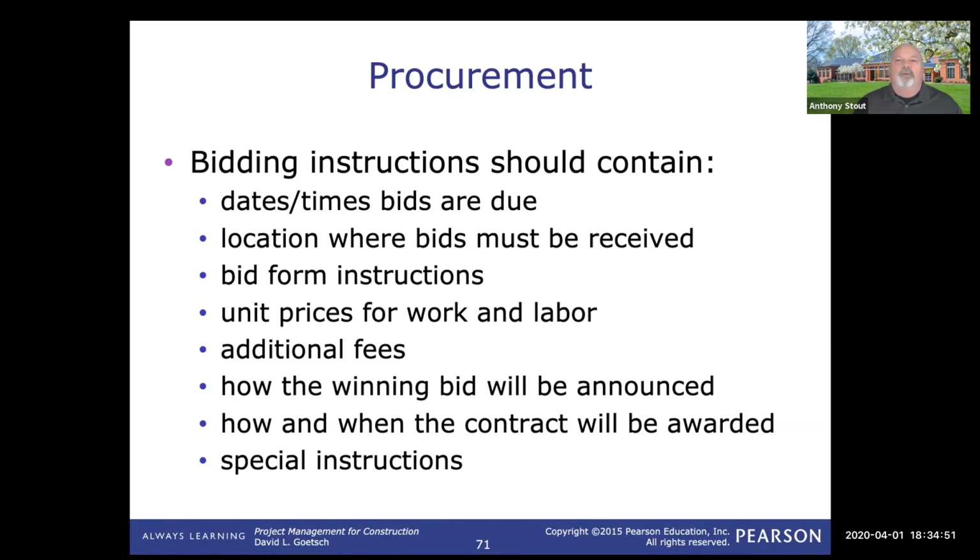This first one that we mentioned, the dates and times the bids are due, I always talk about this, and I talk about it in the estimating class, is that when there's an established due date for an RFP, that is the date. If it's midnight on Friday, then if you turn it in at 12:01 a.m. on Friday, you're out.